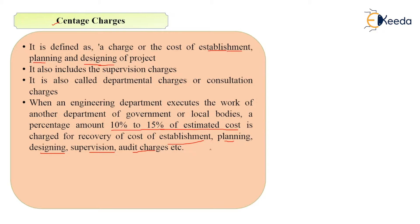When any engineering department executes the work — maybe of another government department or local body — they will charge a certain amount, which will be 10 to 15% of the estimated cost. This is for recovery of costs needed in establishment, planning, designing, supervision, and audit charges. The cost of establishment includes security guards, security cabin, a temporary office for supervisors, various employees, planning charges, and designing charges.